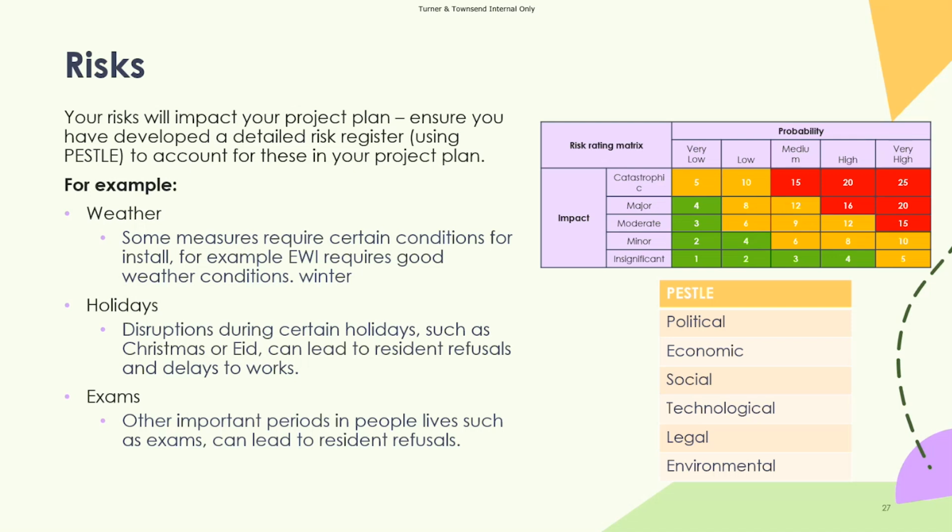Holiday disruptions, so have you considered what holidays are coming up between those installation periods? So things like Christmas, Eid, or other religious celebrations can lead to resident refusals or delays in work. So do make sure that you've accounted for when those holidays are expected to take place and how it might interact with your delivery plan. The other thing is exams. So one of the reasons for resident refusal sometimes is because their son or daughter is currently going through exams, so they don't want disruptive works happening whilst they deliver. So making sure that you've got a good resident engagement approach, but you've accounted for some of those risks where delivering during exam periods is going to be difficult.